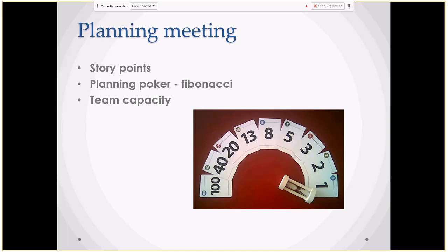Let's say you agreed on 60 points worth of stories, but you delivered only 50, so your team capacity is 50. When you're considering the planning meeting next time, the Scrum Master says team capacity is 50. So next sprint, when you're planning, you will accept only stories worth 50 story points. Likewise, it will go.